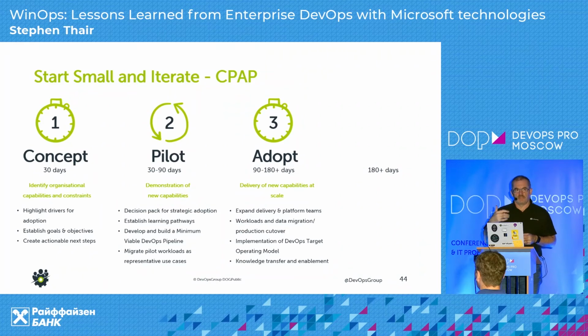We asked them, how many applications do you have? They said about 700. And we said, well, hang on, there's 220 working days in a year. It's 2019 now. They have to be migrating 1.5 applications per day between now and the end of 2021 to be able to actually deliver on that goal.